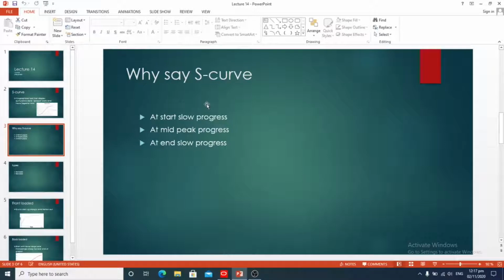As more and more progress is made, growth suddenly begins to accelerate. This rapid growth in the graph forms the middle part of the S. The point of maximum growth is called the point of inflection. These are the most important parts of the curve. At this stage in the progress, the team members generally work quite heavily on the project tasks, and as they step up this progress, more and more tasks surface and so do their costs.